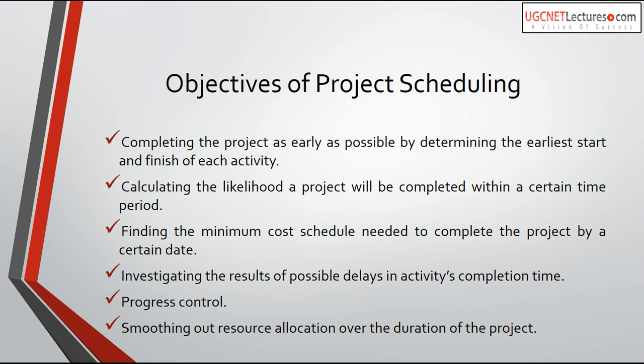Another objective is calculating the likelihood that a project will complete within a certain time period. Every project has a deadline — either given by the client or decided by calculating the time required for each activity. After deciding the deadline, you assess what is the probability that you can complete this project within the given time. Another objective is finding the minimum cost schedule needed to complete the project by a certain date, and investigating the results of possible delays in activity completion time.